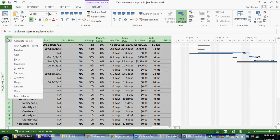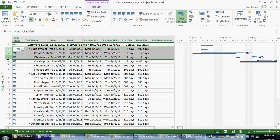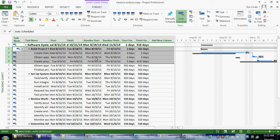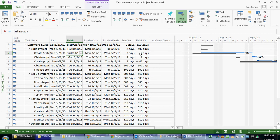When I look at the Variance table, I'm going to focus just on these top couple of tasks here. What we can see is that the start date was scheduled for August 21, 2013 for the current estimate, but the original estimate was the 19th. Therefore, it started two days late, or it's scheduled to start two days late. The same is true for the finish date. The baseline finish was August 28. It's now August 30, so we can see that there's a variance on the finish as well.